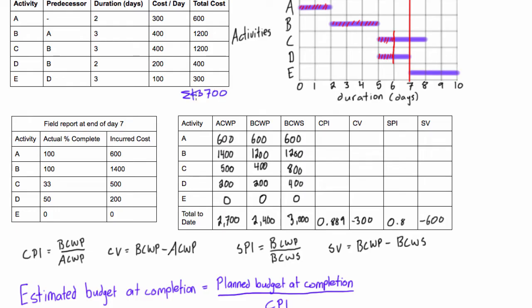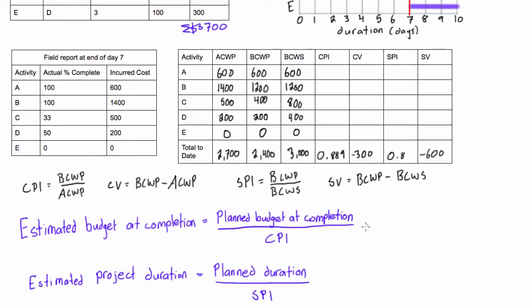Okay, $3,700, that's the total project cost. So all we need to do then is come down here, we have 3,700 and we will divide this by our CPI for the project to date.